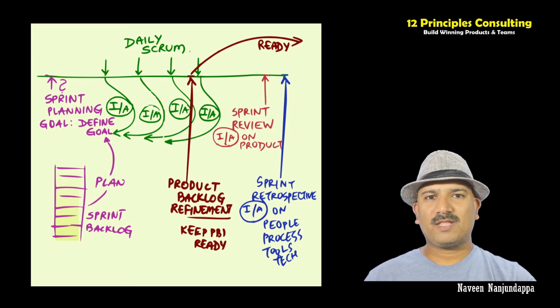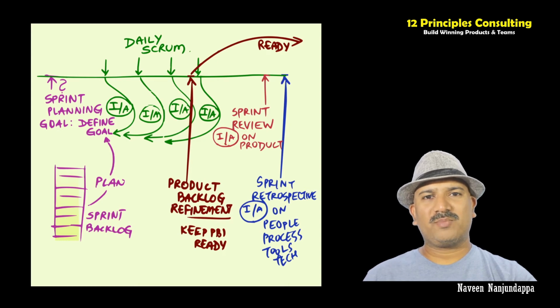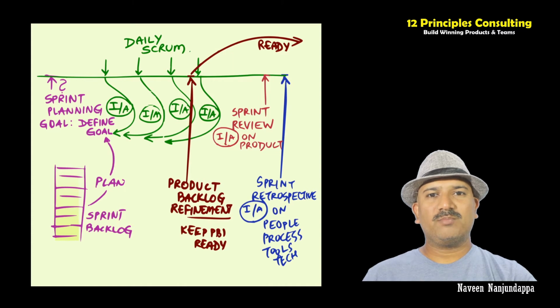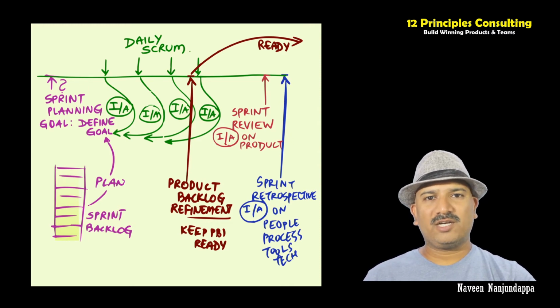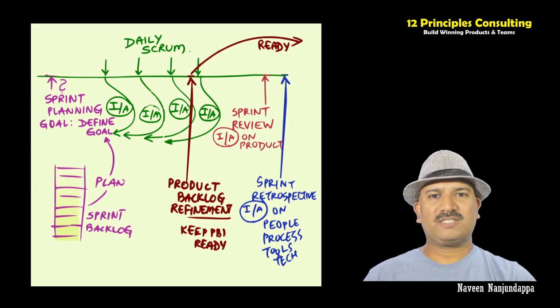During the product backlog refinement, if the product backlog item is big, the team members break the requirement into smaller chunks that are potentially inspect adaptable during the sprint, which is the main purpose of the product backlog refinement, to understand the requirement and break it down into a state which is small and ready to start working. After all these things, the sprint continues one after the other.